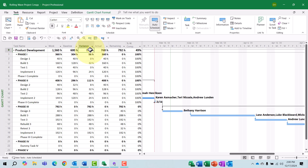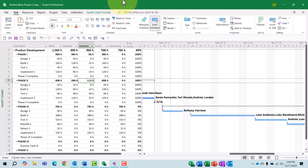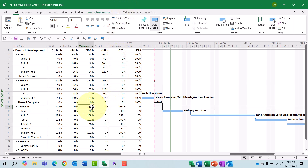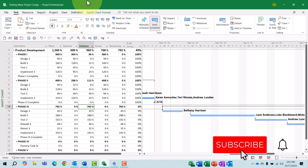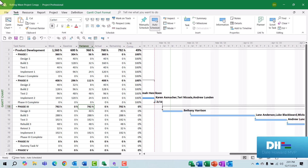Notice that currently there is 960 hours of work variance for the entire project. 56 hours are historical variance from Phase 1, and 112 hours represent historical variance from Phase 2. The remaining 792 hours are present only because these are the new tasks that were added in the Phase 3 section of the project. So at this point, I'm ready to baseline Phase 3, but I do not want to lose the historical variance from Phase 1 or Phase 2.